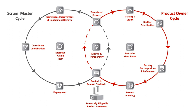Why Scrum at Scale? Scrum was designed for a single team to work at its optimal capacity while maintaining a sustainable pace. In the field, it was found that as the number of Scrum teams within an organization grew, the output, working product, and velocity of those teams began to fall due to issues like cross-team dependencies and duplication of work. A framework for effectively coordinating those teams was needed in order to achieve linear scalability.